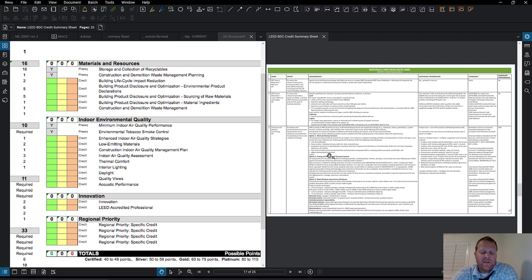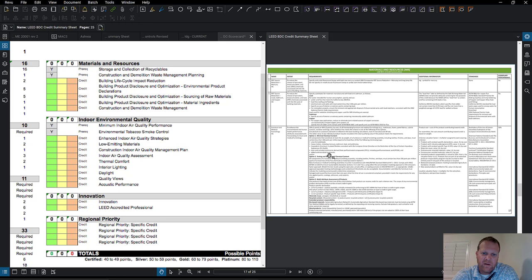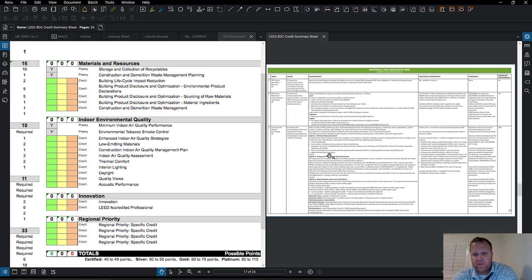Some lessons learned from a general contractor standpoint: it's a lot easier to do this incrementally over time rather than trying to slam it all together at the end of the project. I had a project where the project engineer was supposed to be collecting data for the LEED manual and tracking recycling and doing reports for the indoor air quality management plan. After an internal audit, we realized he had nothing — he just wasn't doing it. That was an error on my part for not checking in more frequently.